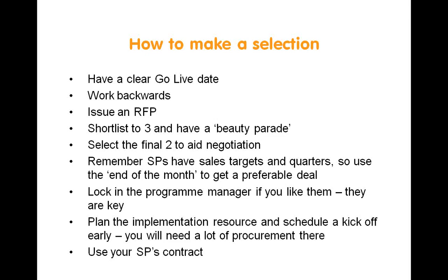Do shortlist around 3. Have the service providers come and defend their responses to the RFP. Do have some kind of beauty parade. Then reduce it down to 2 to aid negotiation.